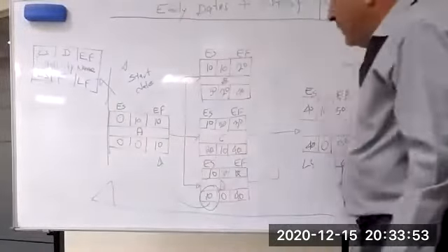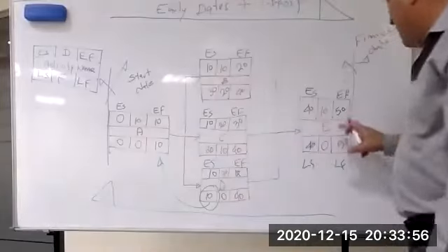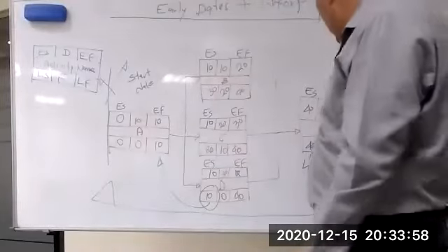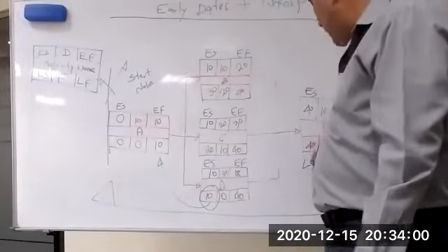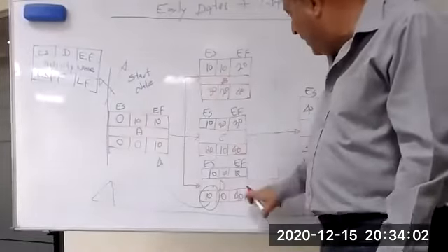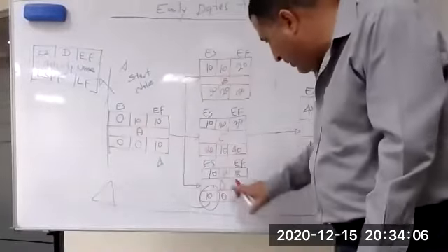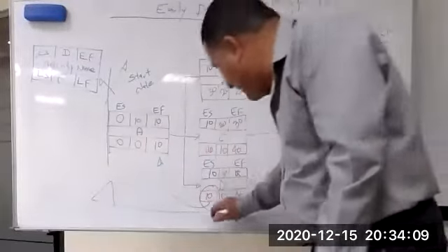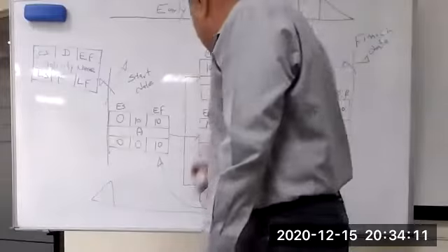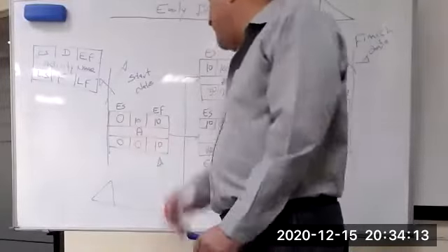Forward, back forward. We come here, 50 minus 10, 40. 40 minus 10, 30. 40 minus 20, 20. 40 minus 10, 10. I will take the lowest, let start, 10. 10 minus 10, 0.